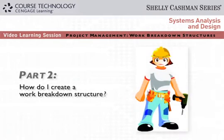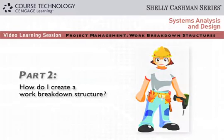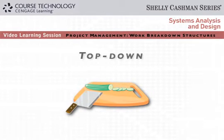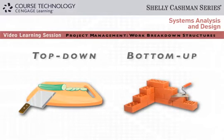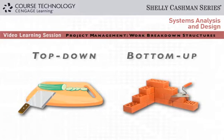You can create a work breakdown structure from the top down, or from the bottom up. A top-down approach breaks the project into smaller task groups, and then into individual tasks. A bottom-up approach identifies all the tasks first, no matter how small, and then builds them back into a logical structure. Depending on the project, you might use either method or both. The objective is to build a structure that lists and describes all tasks accurately.